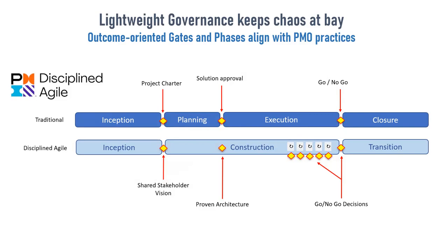And this is as prescriptive as it gets. All it says basically is it recognizes that Agile needs an inception phase. It's that simple. And the Agile community recognized that also. They call it Sprint Zero, except that every Scrum exam I've ever taken has a trick question that tries to trap you into using Sprint Zero, because you will lose points. Scrum's stated position is there is no Sprint Zero in Scrum.